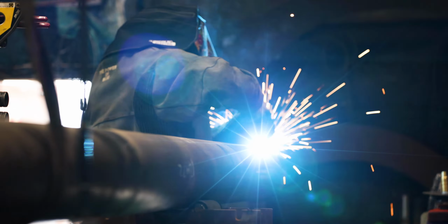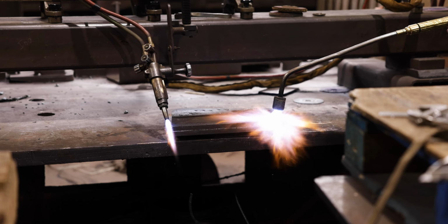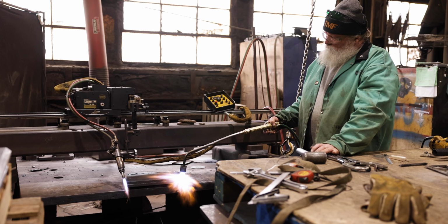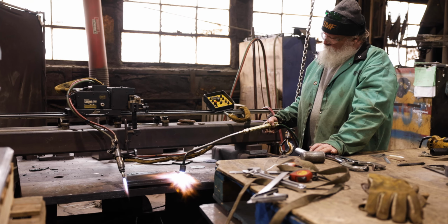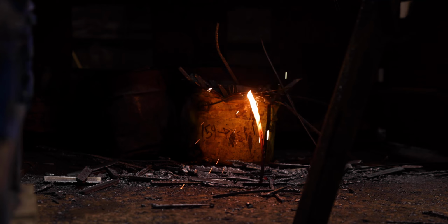Industrial Metal Fab has never been afraid of low quantity orders. That is what our business consists of. Partnering up with Steel Warehouse has allowed us to greatly reduce our lead time. Typically, when purchasing from discrete plate mills, our lead time is 8 to 12 weeks out. I've been able to shorten my lead time and planning with Steel Warehouse to about 4 weeks out.